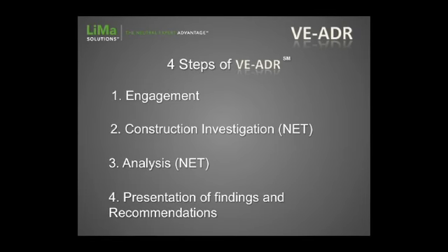We usually do a presentation. Jim Kirkhill's been with me in a couple of the more sophisticated presentations. He's going to talk about it. And we basically explain, here's what we did, here's how we did it. Everybody had buy-in. We had input from everyone. Here's the analysis that we did. Here's what we came up with. Here's what needs to be repaired. Here's the cost of repair. Here's an allocation based upon technical issues only. And then somebody else would address, Bob Friedman, for example, if there is a neutral analyzing it. If not, we turn it over, and then they start talking about the legal issues, defenses, and coverage issues.